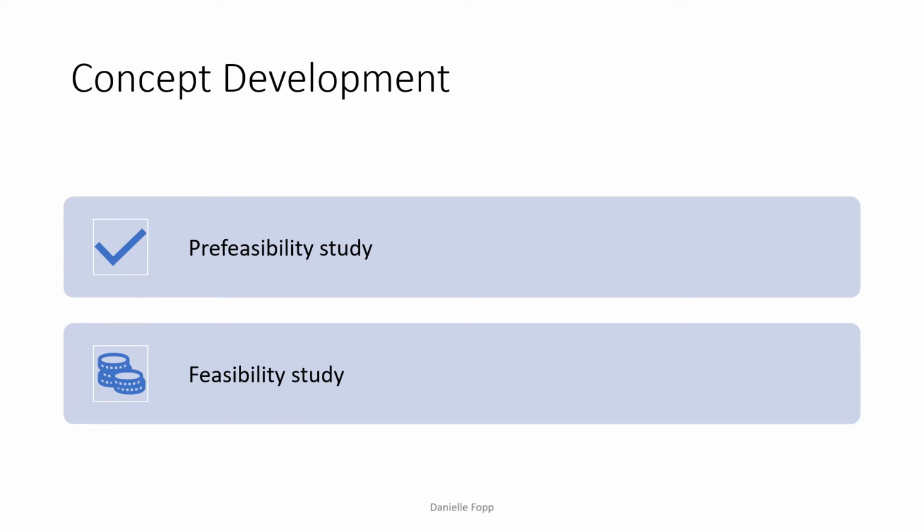In this phase, we want to discard any unattractive ideas and choose the best among many. The term feasibility study is often misunderstood and often misused. Frequently, an outline of the project and technology to be used is called a feasibility study, but it is rather a technical study or a support study. If it does not cover multiple feasibility aspects of the project, as required for an unbiased project appraisal, it is not a feasibility study.